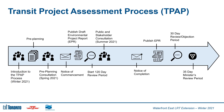Once the notice of commencement is issued and the report is published, this starts the official 120-day review period, where the draft EPR will be reviewed by the public and stakeholders. During this period there will be another public consultation. The 120-day review period will end with a notice of completion and the final EPR will be published, which will reflect the outcomes of the review process and any changes that were made as a result. There will then be a 30-day review objection period followed by a 35-day review by the provincial minister.